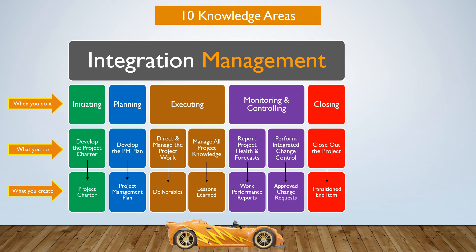Monitoring and controlling the project is all about comparing what you planned to do on the project to what's actually happening. During monitoring and controlling, we need to be able to report on our project health and make forecasts about the future of the project based on what we see happening. We also need to perform integrated change control, which means we're going to experience change on the project — stakeholders will request change, and sometimes change is inevitable as a factor of the environment or project circumstances. We need to make sure that we control that so it doesn't get chaotic. Monitoring and controlling should produce work performance reports and approved change requests.